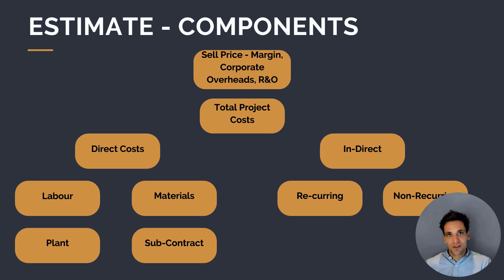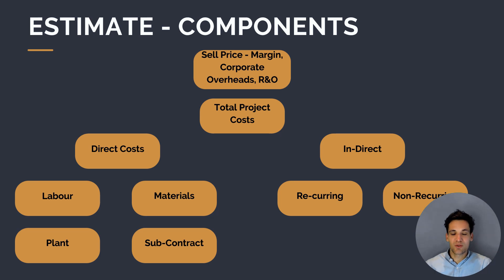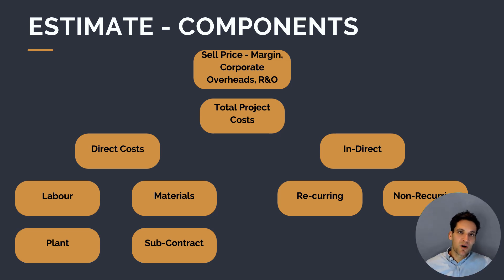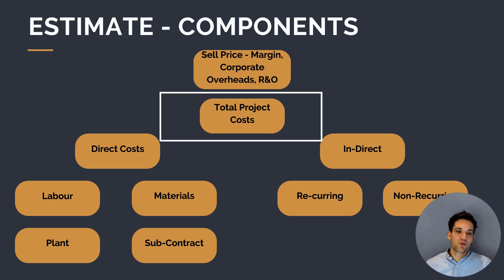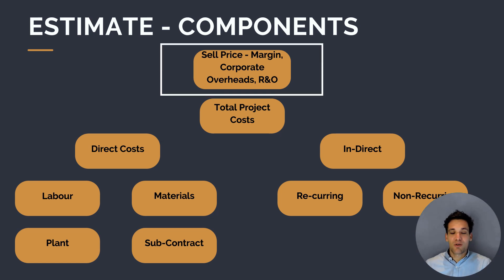Then we've got our indirect costs — the costs to manage and supervise the works. We can break these down into two key categories: non-recurring indirect costs, which are one-off costs such as setting up site facilities, and recurring indirect costs, which are ongoing costs throughout the duration of the project, such as the salary of the project manager overseeing the work. We combine our indirect and direct costs together to get our total project costs, and then to work out our sell price — what we charge our client — we add on our profit margin, any corporate business running overheads, and any risk and opportunity.